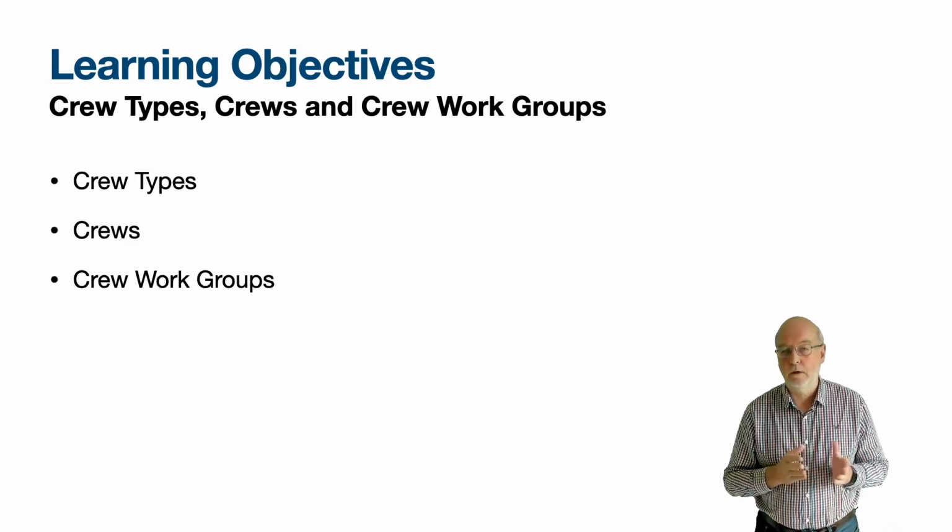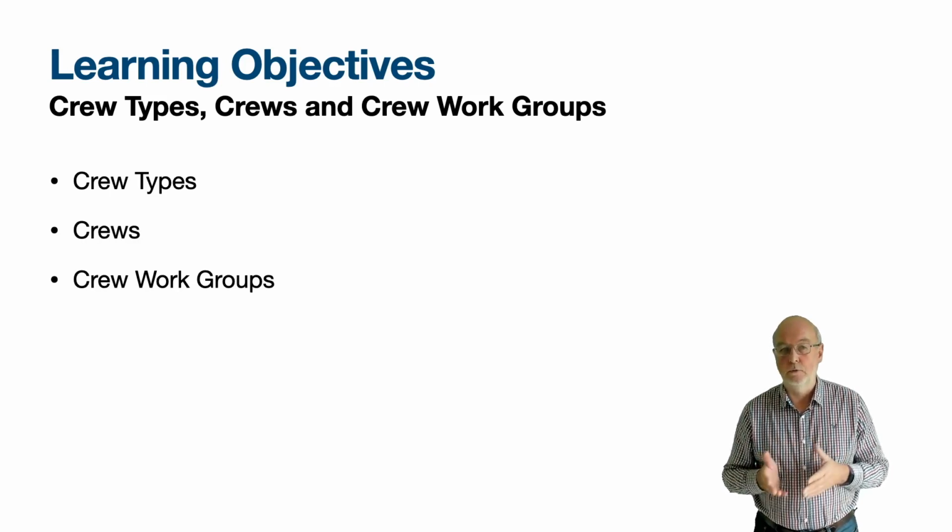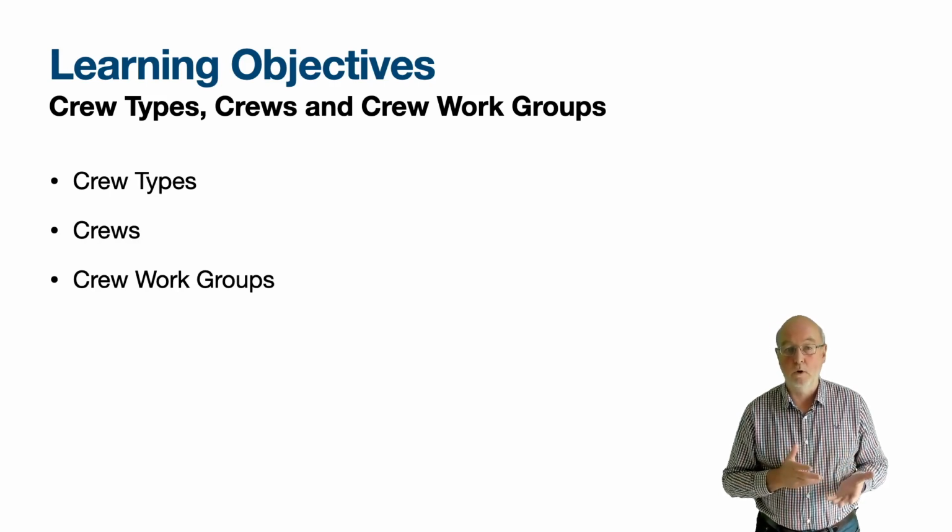When considering work planning, you can think of a crew type like a craft. It is what you reference on a job plan. I need a crew of a crew type to fulfill some work. When the assignment is made on a work order, you are assigning one of the crew in a similar way to how you assign labour to a craft requirement.